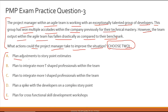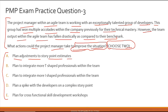There are five options to analyze. Option A: plan adjustments to story point estimates. Will that really improve the situation? If you adjust pessimistically — giving the team four weeks instead of three — you're booking a delay but not solving the root cause. You also can't reduce timelines for an already struggling team. Story point adjustment alone will not improve the situation, so option A is incorrect.